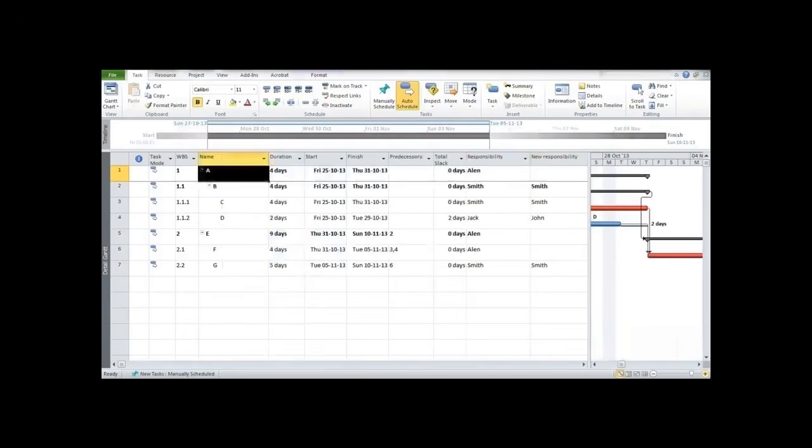Recurring activities. Say a specific activity repeats on a specific day of the month, or a specific day of the week, or a specific day of the year, or a specific time frame during the year. Then we need not enter that activity or task again and again. Microsoft Project 2010 has a feature named recurring task, in which we can enter the task which recurs and mention the interval of its repetition. Thereby it appears in our task list automatically, and we need not enter all the values manually.